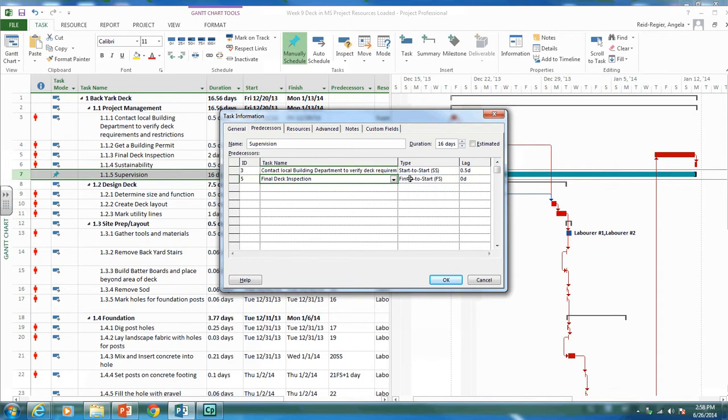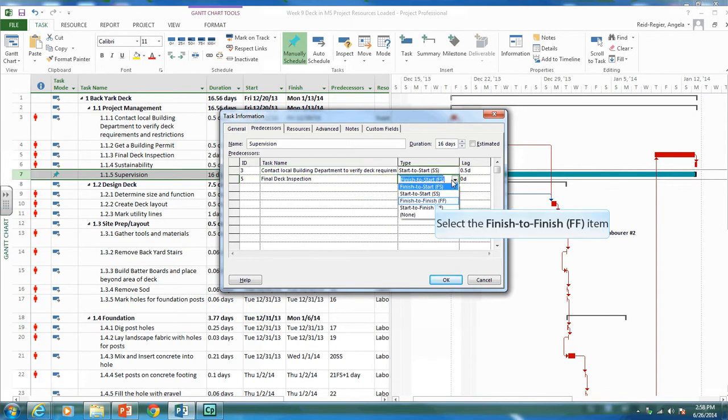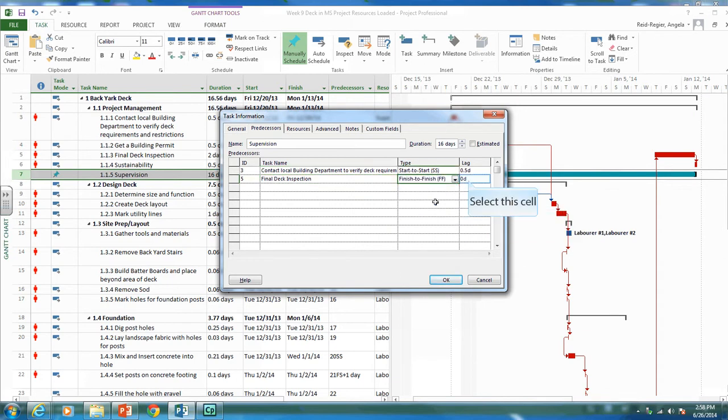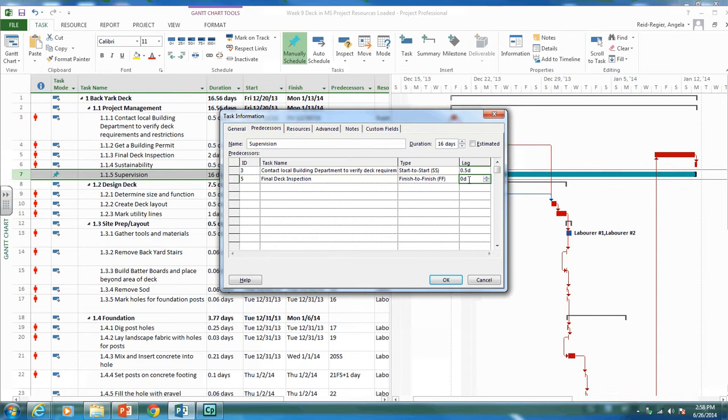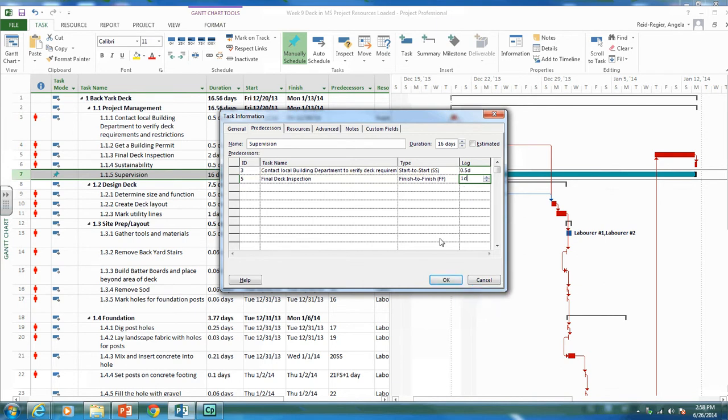And again, we want that as a finish to finish activity. We can have it, once that's done, there may be some loose ends for the supervisor to tie up. So let's put one day lag that it will finish a day after that final deck inspection is done.